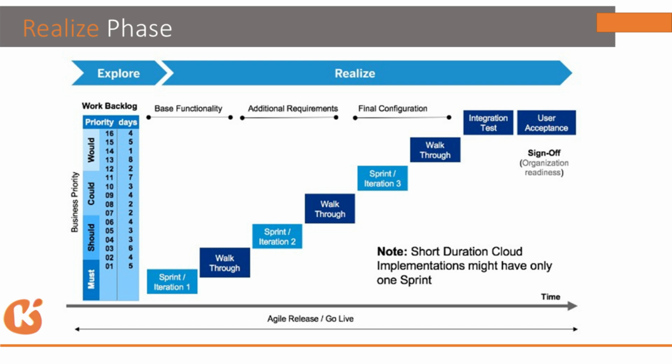Okay, you have total activities. You know very well as an ECP consultant what needs to be done. You cannot do PCRs directly initially, right? Because you don't have any system configuration in the system. You cannot do any PCRs, right? The same way, if you want to start the integration with other modules, FICO or whatever it is, without creating wage types, without creating symbolic accounts, without creating GL accounts, you cannot map anything in the FI system, right? So all these important things which we need to do will be covered in the iteration, the grouping of all activities.